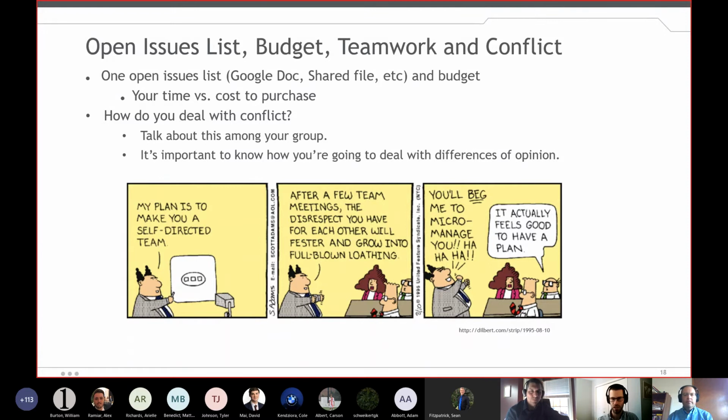So in addition to your plan, you're going to get questions you don't know the answer to or didn't foresee, and having one spot to put that is very important. Greg kind of touched on having a budget, and that is important even for smaller projects. Even as an engineer, when I'm told to go off and work on something, I would keep my own little budget so that I know whether I'm tracking to the bigger project budget. So just something to keep in mind, that you still want to do that even for a personal budget, if you're working on your chunk of the project.